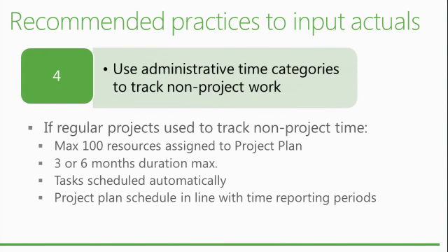When you do that, every resource assigned to the task is going to generate a lot of records over a very long period of time, which makes your reporting database grow a lot, because the data in the published database is stored time-phased. So it's going to expand the size of the tables in an unexpected way.